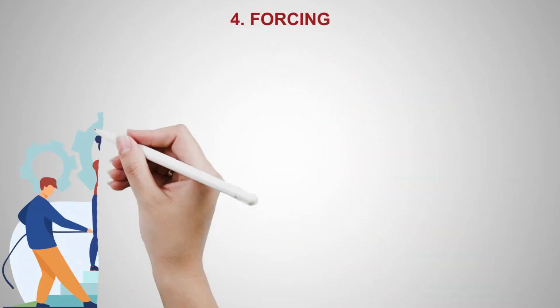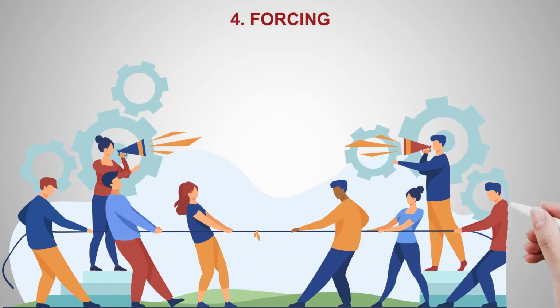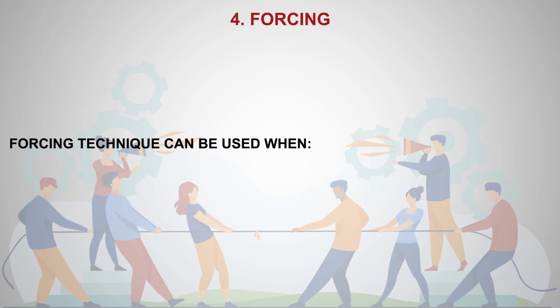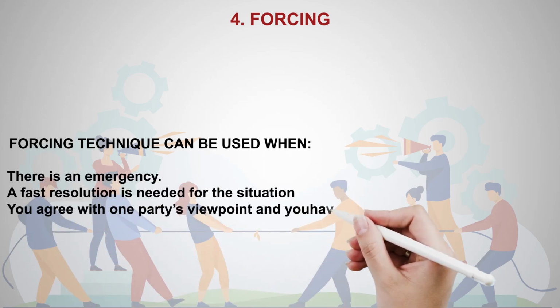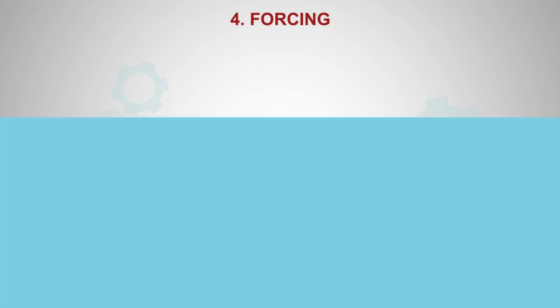4. Forcing. The project manager acts in a very assertive manner to achieve his goals or agrees with one party's viewpoint and enforces it on the others. It is also known as competing. The forcing technique can be used when there is an emergency. A fast resolution is needed for the situation. You agree with one party's viewpoint and you have limited time to solve the issue.